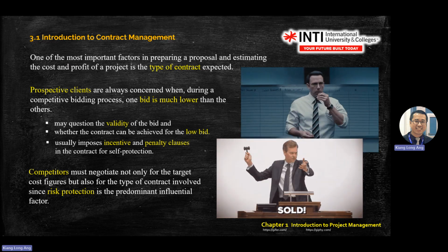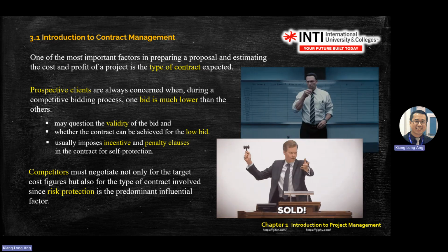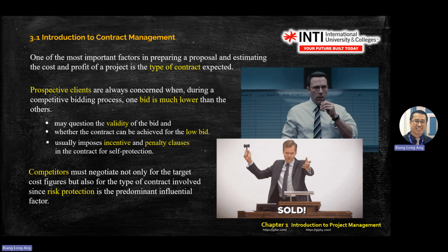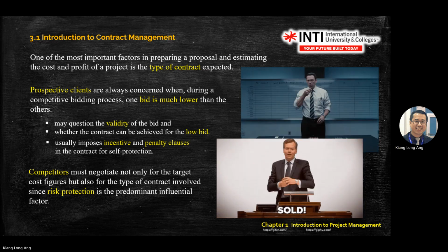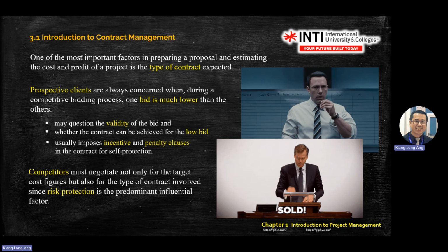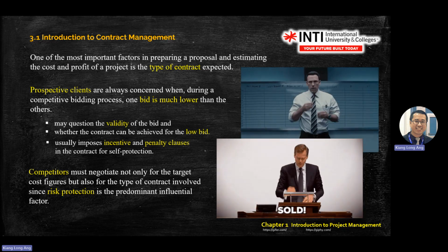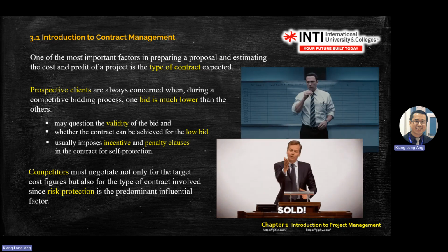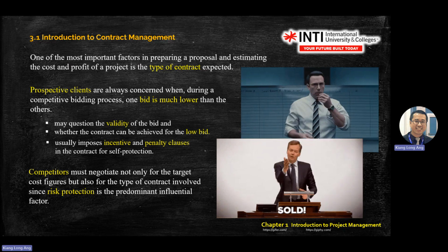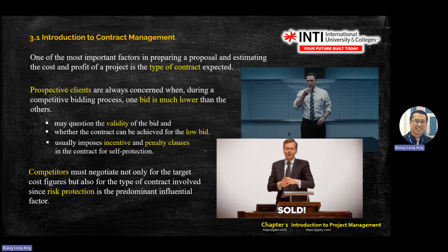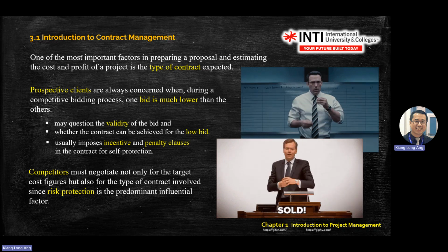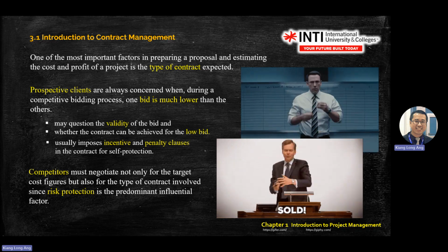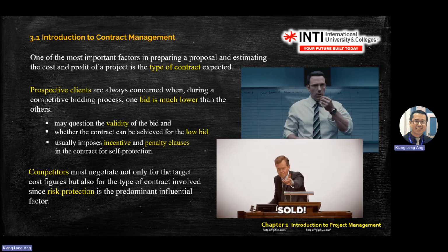So when you go to work later, all of you have been to internship, right? When you go to work later, especially if you handle projects, make sure you mark up. If engineering tells you 3 weeks, then you tell the customer 5 weeks or 6 weeks. Maybe the production floor only finishes in week three, maybe it delays to four weeks. But you tell the customer, hey, I can give you 5 weeks, because you probably spend 6 weeks.